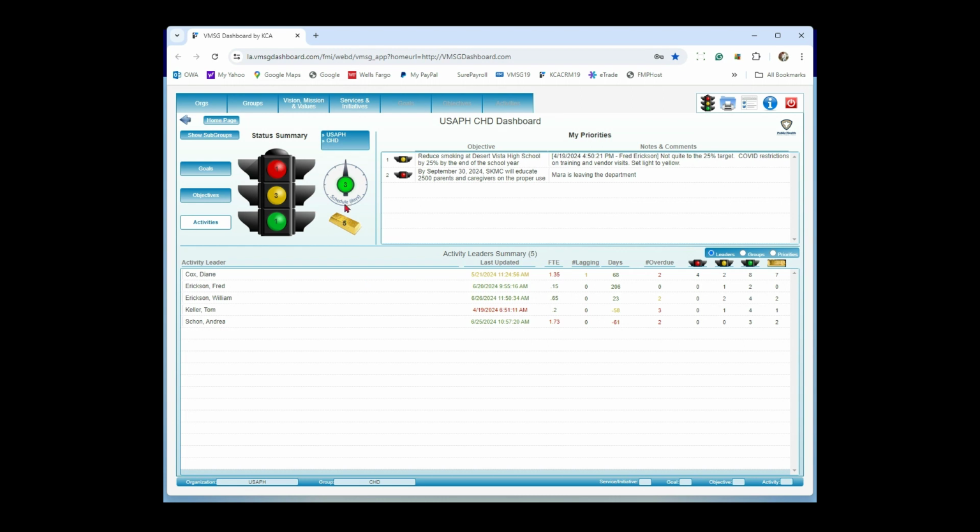The other thing I see is the schedule gauge. The schedule gauge is showing me that across these 10 activities, in aggregate, we're about 3 days ahead of schedule. And it's calculated pretty simply: beginning date, ending date, percent complete, and then aggregating those together. So if I'm mostly green and gold, I'm doing really, really well. I might want to, again, drill down and find out what's going on with the reds and yellows. Now, I can drill down even further down here at the bottom.